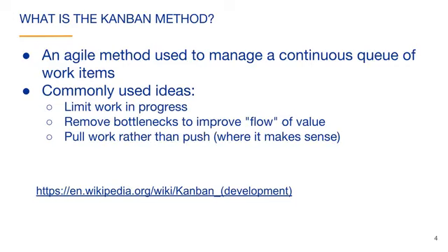Pull rather than push work where it makes sense. For many steps of a process, it is better for someone working on the next step to pull the work from the previous step rather than having it pushed on them when the previous step is finished. We will discuss this idea more later.